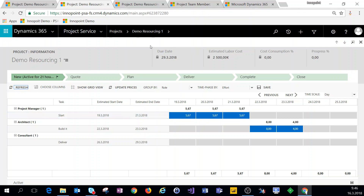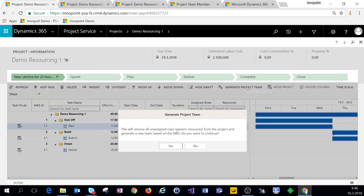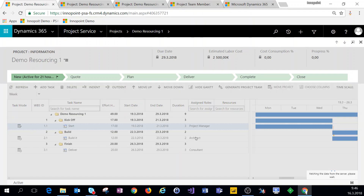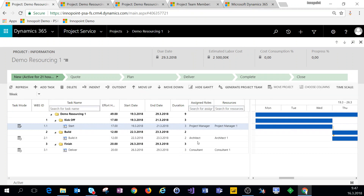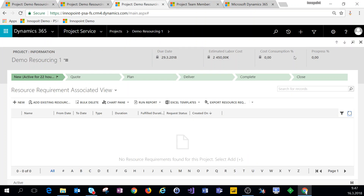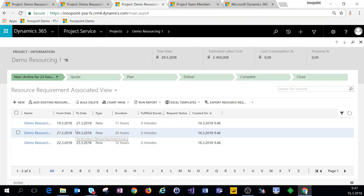Based on this, what we'll do next is generate a project team. When I click on 'Generate Project Team' I will get generic resources for this specific project. A generic resource of project manager has been filled in for this task. If we look at resource requirements, we can see those were formed when we generated the project team. For the three tasks on the work breakdown structure, we now have matching resource requirements.